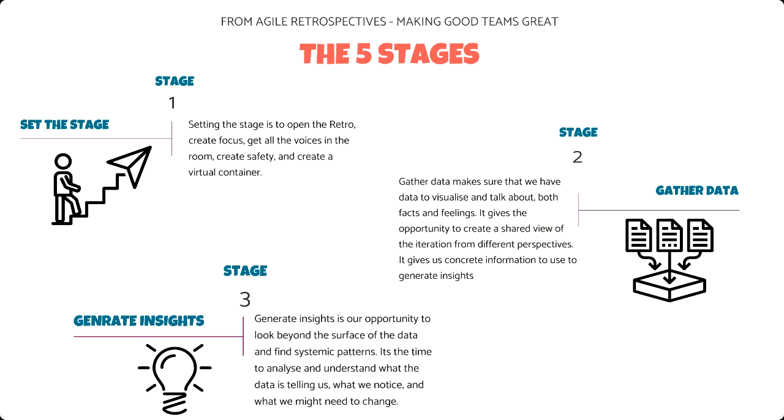And so, we need to think about, okay, hang on a second. If we're getting the same answers, then maybe we need to change how we're asking the questions and what we want to know. So the cool thing about when we've got data is we can start looking for patterns. So we can ask pattern questions. We can ask questions like, what do you notice that's the same? What do you notice in general?